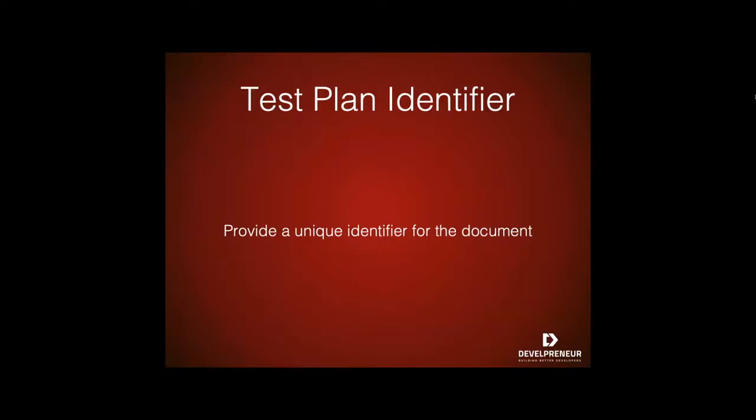Also, make sure you always use correct versioning date and versioning numbers of the procedure. Otherwise, you will not be able to tie this document to the specific changes later. Also, don't forget to include who the version author is and their contact information. This will be crucial later in case there are any questions or discrepancies in the plan that need to be clarified or addressed. Finally, include the revision history of the document. This revision history identifiers should be changed to reflect the revisions to the document. Each revision history will also need to be added to the identifier section or introduction.